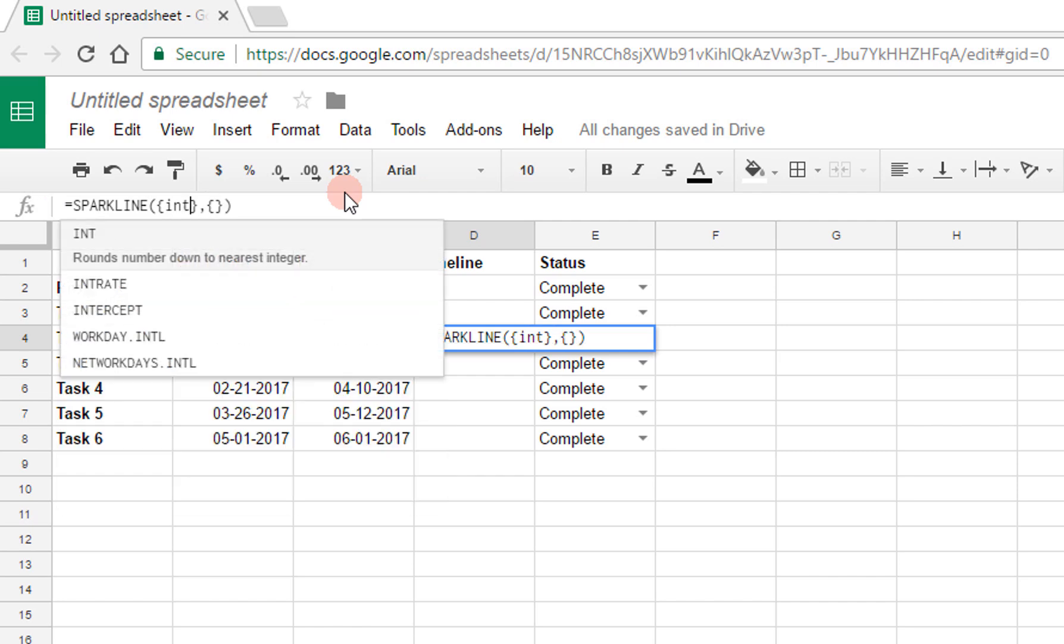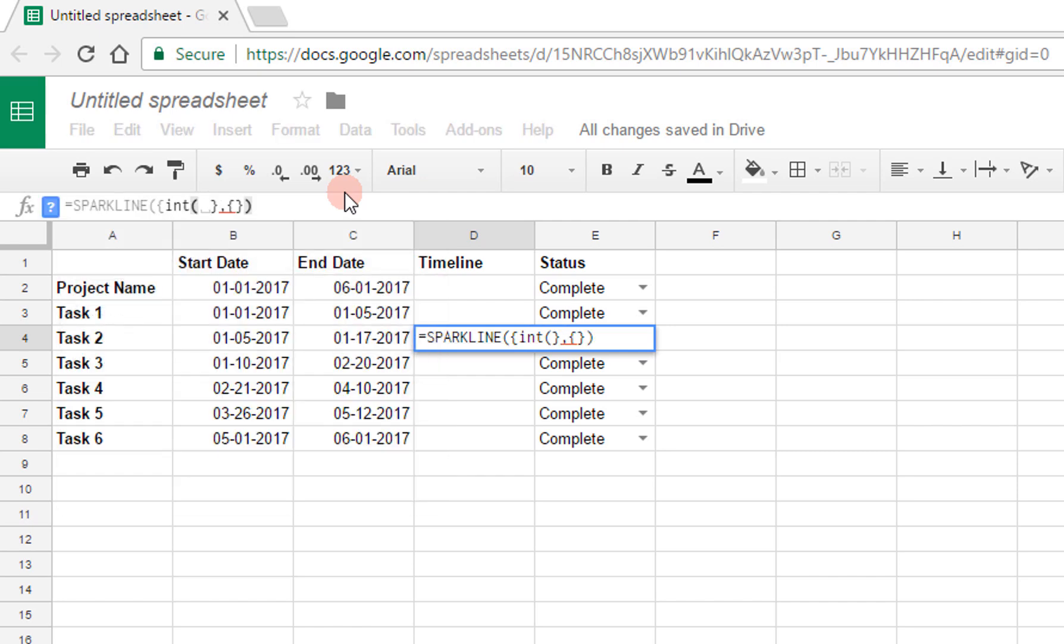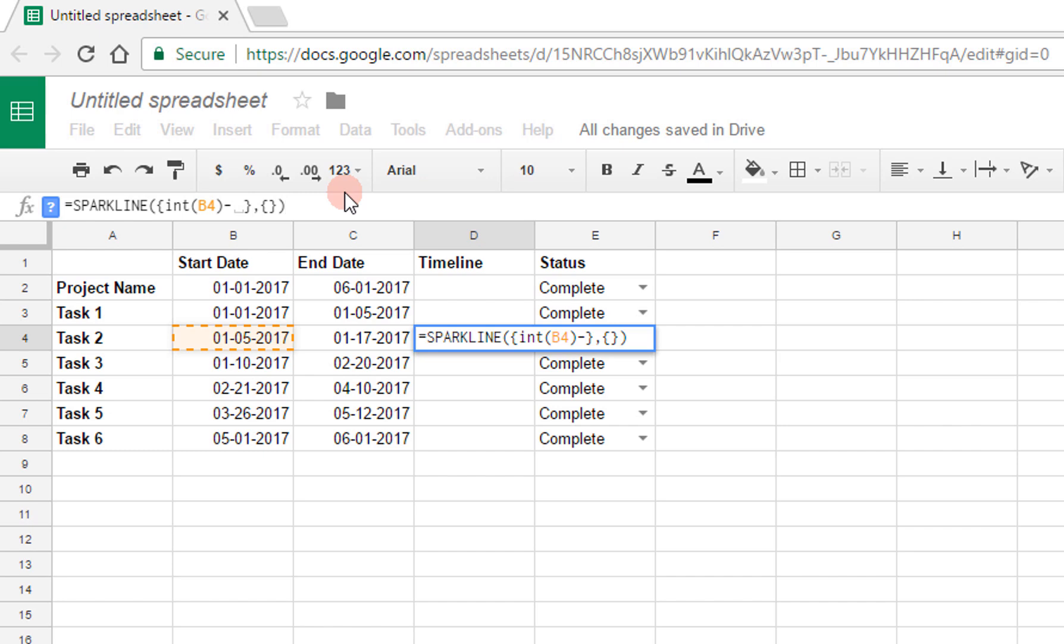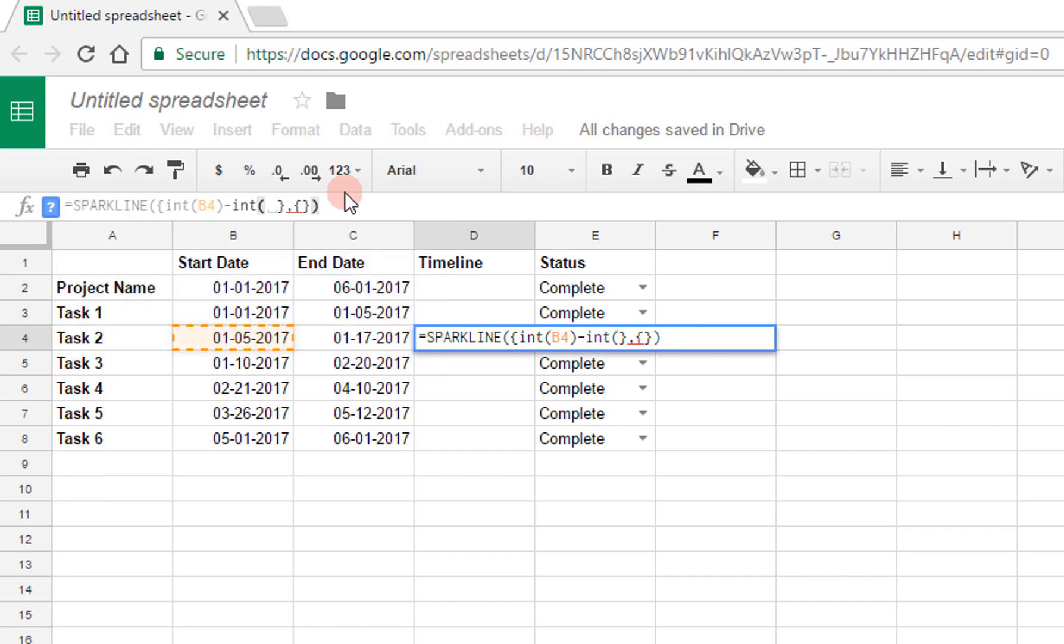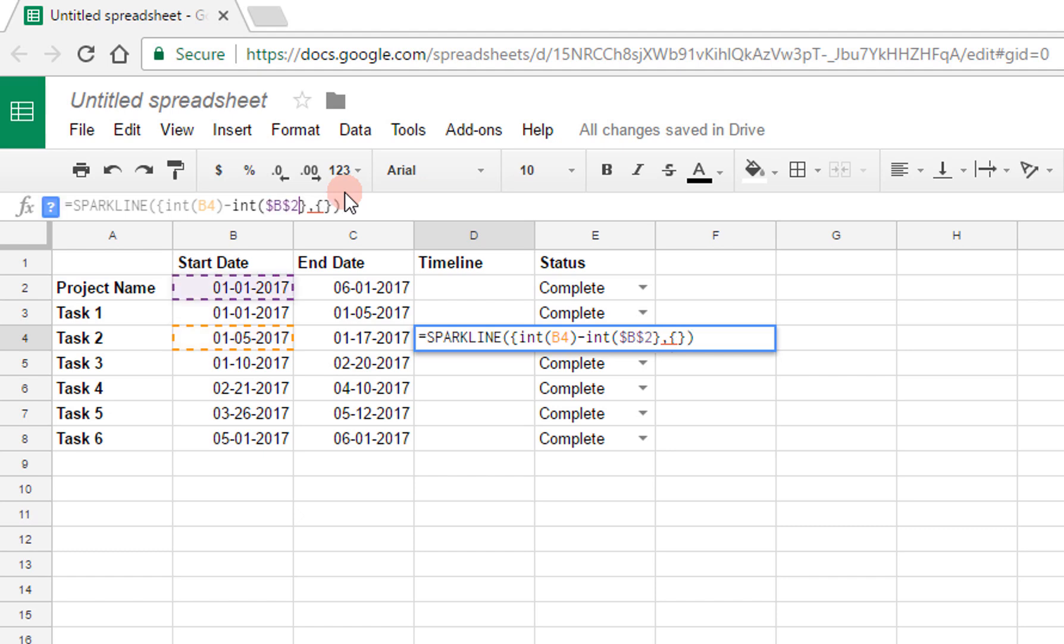So I'm going to reference things here, and in order to use dates as numbers and be able to subtract one from another, I'm going to use the int function. So I'll say int of, and here I'll say cell before, so that's the start date, int minus int of, and here I want to reference the start of the project. But since I'm going to generalize this format to the other cells, I want to fix which cell I'm referencing to because I always want to reference the same start date of the project. Therefore I'm going to use dollar sign b dollar sign 2 to fix that to that particular cell instead of propagating it.